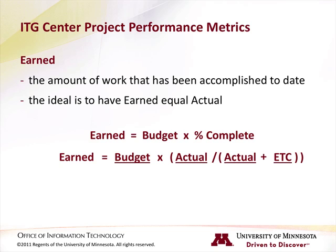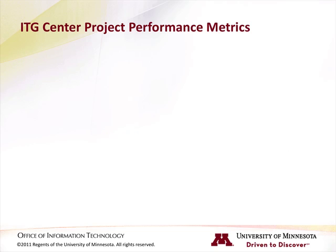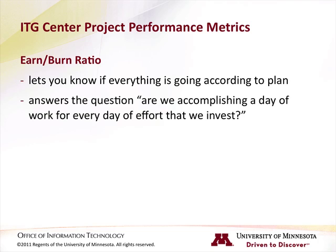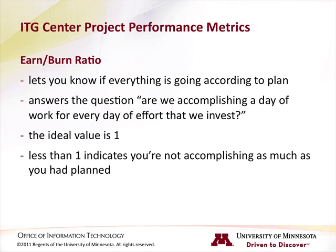Next, let's look at the earned-burn ratio. The earned-burn ratio is the metric that is most often referred to, and basically it lets you know if everything is going according to plan. It helps to answer the question: are we accomplishing a day of work for every day of effort we have invested? The ideal value for the earned-burn ratio is 1. In general, values less than 1 indicate that for the work you're doing, you're not accomplishing as much as you had planned.